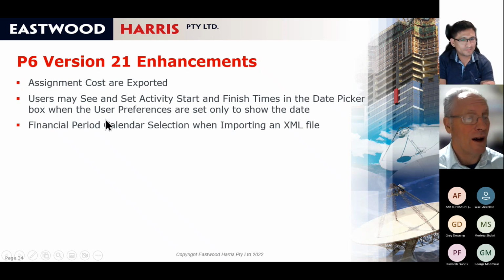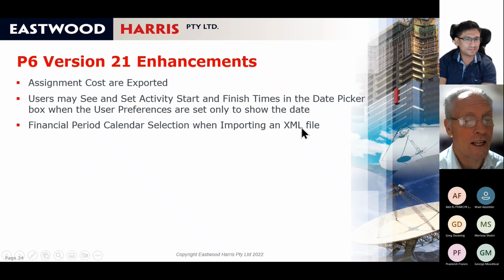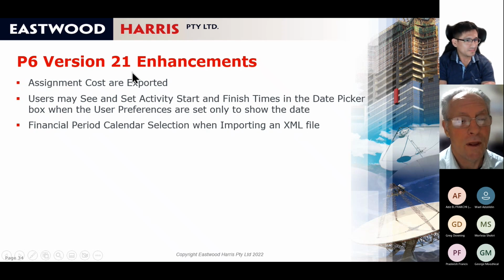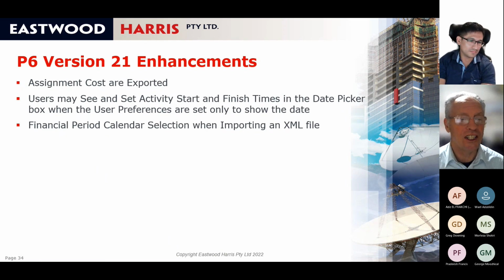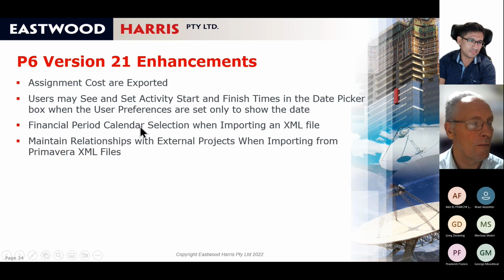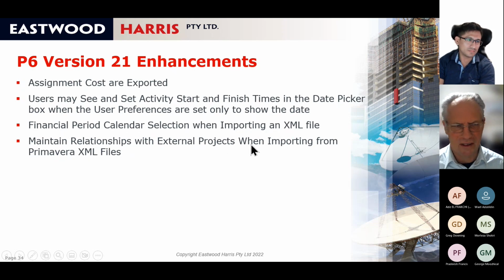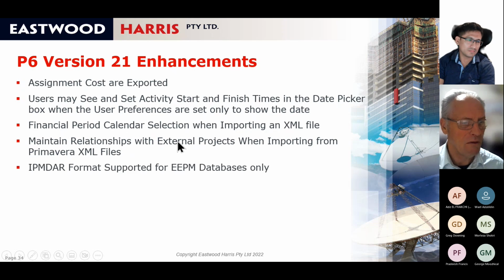You can select the financial period when you import an XML file. So in version 20, you could have different financial periods, but now you can select which one you want to use. So you can actually change the financial period on import. You can maintain relationships with external projects when importing from a Primavera XML file. I'll have to demonstrate that. It doesn't make a lot of sense by reading the description.